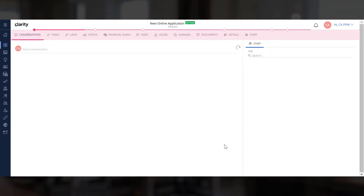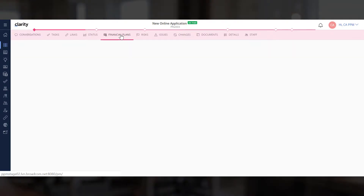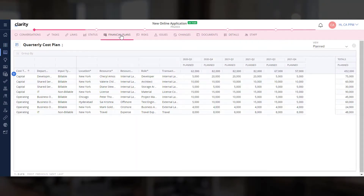Let's explore the new project and navigate to the Financials tab. You will see the cost plan associated with the idea has been copied to the project.